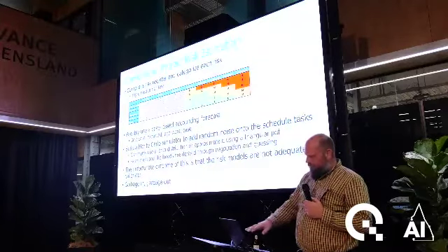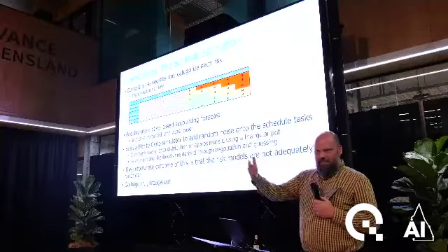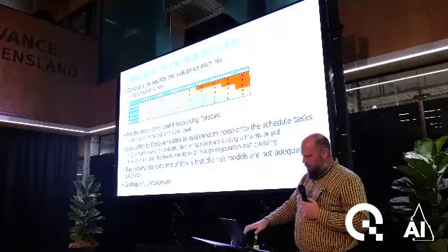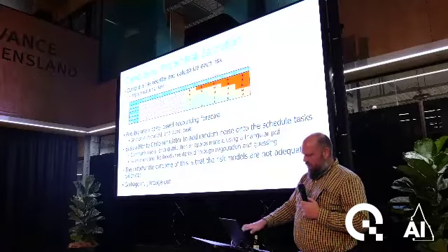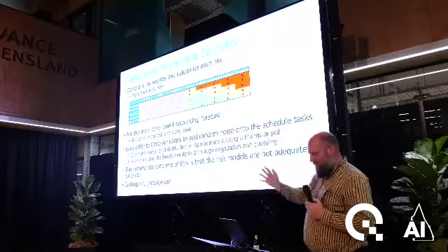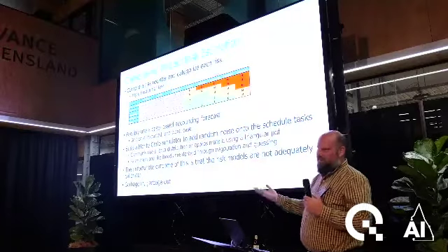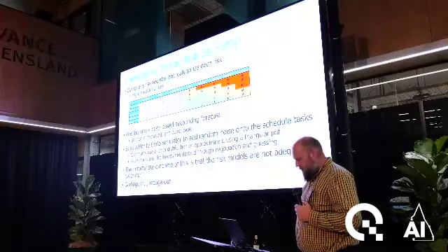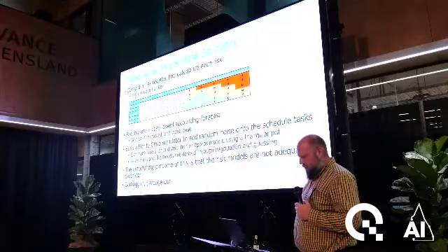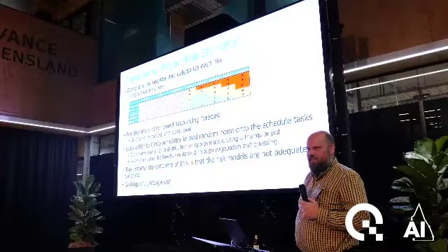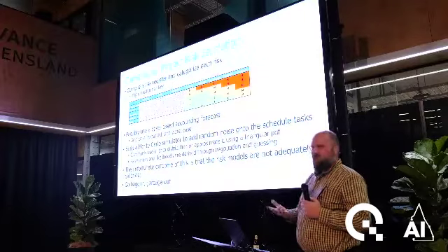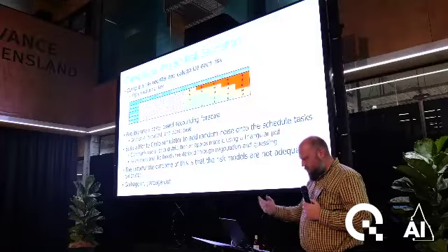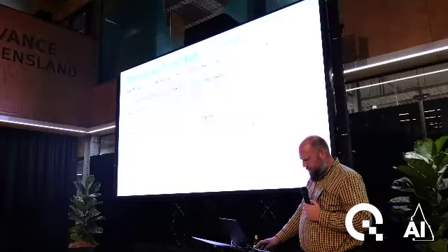But again, a lot of the parameters that are going into it are basically guesses, or people have made these things up. And commonly they'll use things like a beta distribution, and even worse, they'll approximate it by using a triangle. So you can see that it's just sort of to show that something's happening. And the outcome of this is that the risk models aren't adequately calibrated, and anybody that's building models in AI knows garbage in, garbage out, right? And that's what we're trying to change in the industry at the moment.